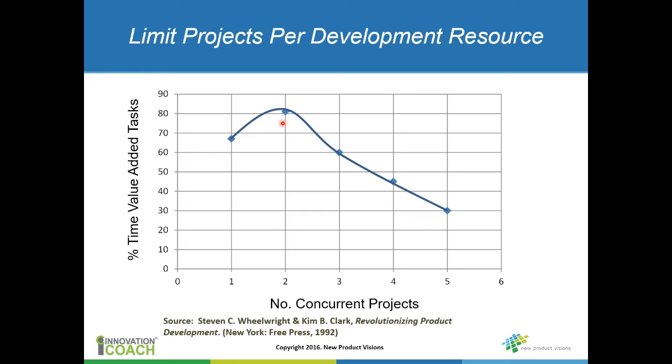And if that person is working on two projects that are in that same phase, then that could be a problem as well, depending on the scope of the projects. It's better really to try to, if they are working on two projects, have one in the early phase and one in a more critical later phase. So you have to think about critical paths and where they are in the phases.